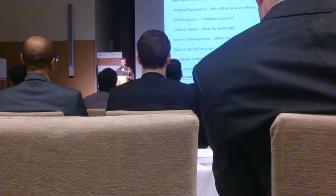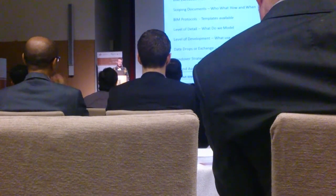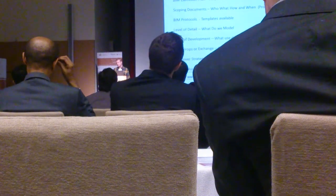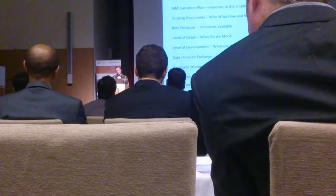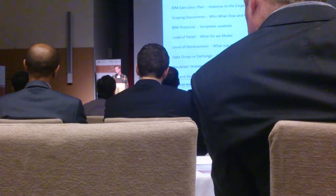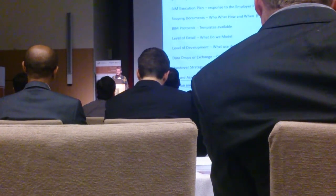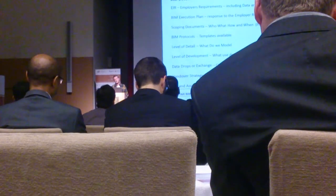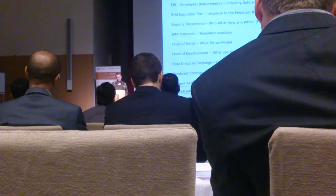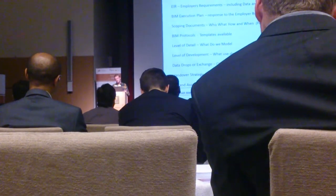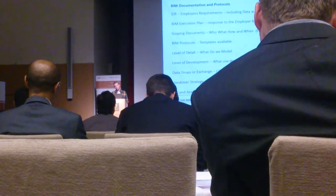The most important document for me is the Employer's Information Requirements — that's how we set up the data and the model exchange, and from an FM point of view that's really important. Then you've got the BIM Execution Plan, which is a response to the employer's requirement. Scoping documents are very important to drill into the detail — look at the level of detail, get into the works. Are you going to model everything? What's the level of detail in the models at each stage of the project?